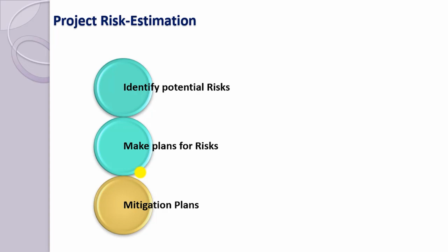So when the risk is pretty severe, for example, if we are talking about new technology that has to be learned by the team, and the team resources don't have any idea of the new technology, we need to define the severity as high, because your team does not know the technology and the client has given you a deadline. So in these cases you need to come up with a mitigation plan wherein you can ask your senior resources or senior technical architects to come in, help your team and mentor your team in the new technology. This is how you mitigate the risk.